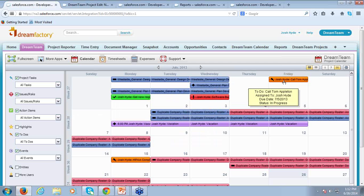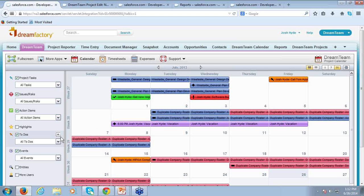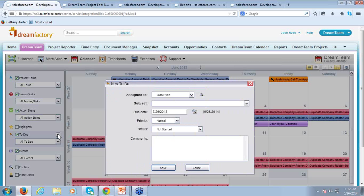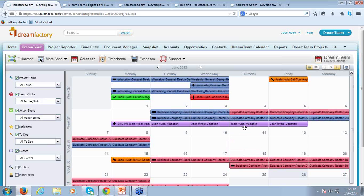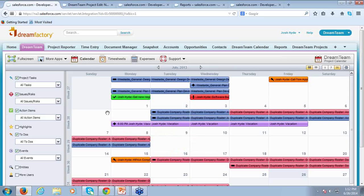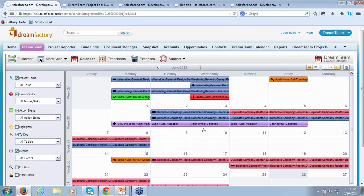This is a fully unified calendar with Salesforce. The orange items are what we call to-dos — those are just Salesforce tasks — and we call them to-dos to avoid confusion with our project tasks. Purple items are Salesforce events, and we can see and create those here as well. This is especially important: as a project manager, before you assign a resource to a task, you can see if someone has a week's worth of vacation marked on their Salesforce calendar as events, so you know their obligations even if they're clear of DreamTeam tasks.